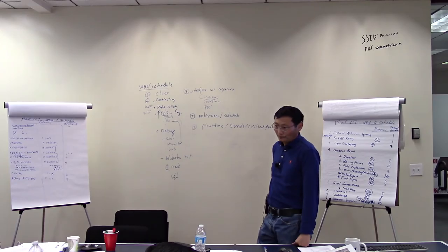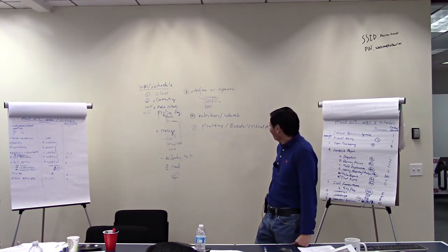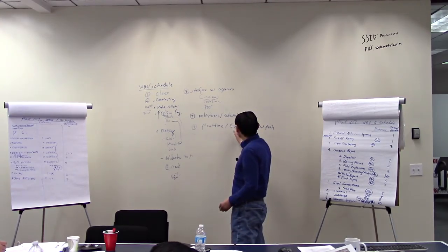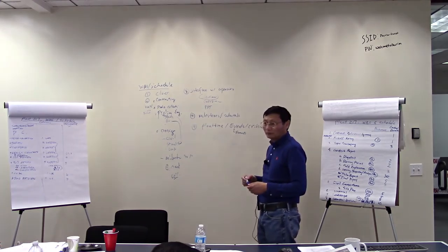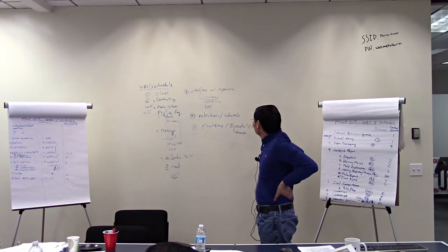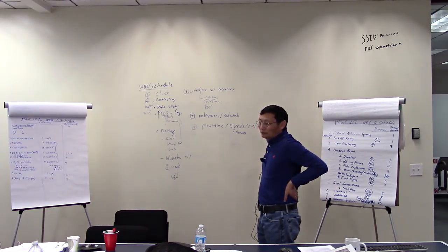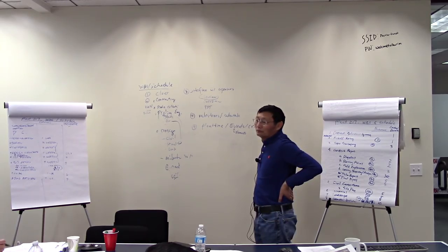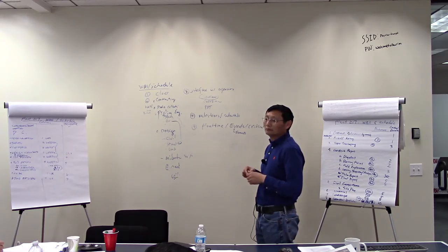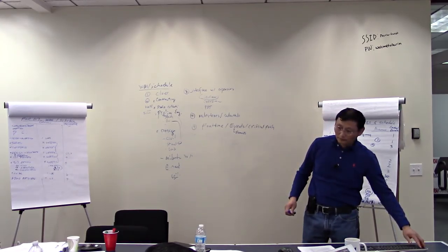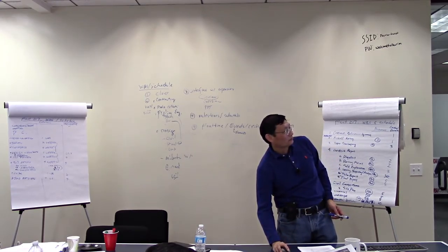And then here you mix a kind of level one, level two, level three, level four of things. So you want to establish events first, and then under each event, you have elements. In the jargon here, element means activity. So level one elements could be level two events, and level two activities could be level three events. So you just think about it this way. You establish it depending on the size of the project. You can have just two levels, and I believe that here you have two levels maximum, right? Then you will be able to really define what you want to achieve.